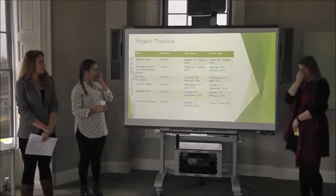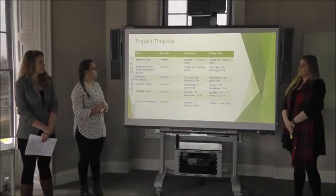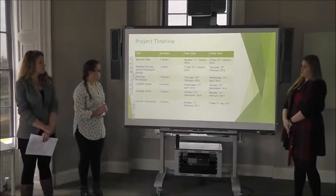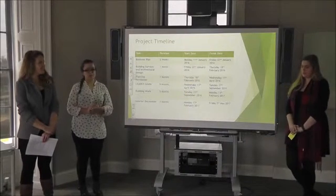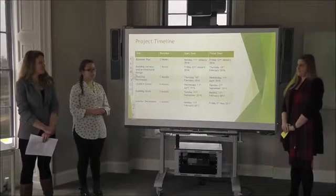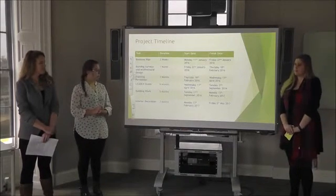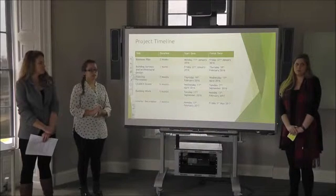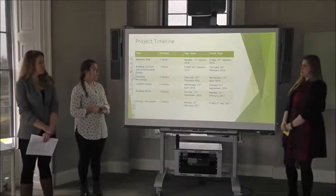The business plan will take 2 weeks, and this includes what we plan to do. Building surveys and architectural design will take 2 months. This looks at whether the buildings are suitable for our use and what we plan to do with them. Planning permission can take up to 8 weeks. However, any complications may push us back.